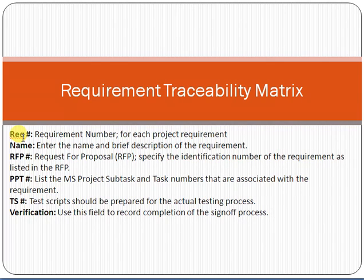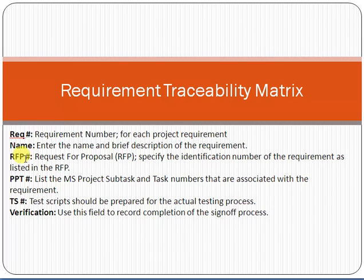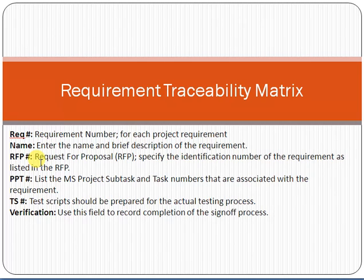The fields included in the Requirement Traceability Matrix are: Requirement Number — a unique number assigned to each requirement; Name — every requirement has a name; and Description — a description of the requirement. Then there is the RFP Number. RFP stands for Request for Proposal. Whenever a project is signed, an RFP is floated, and the RFP reference number is mentioned here. For example, if a requirement was mentioned in the RFP as section 2.2, you write 2.2 in the RTM.